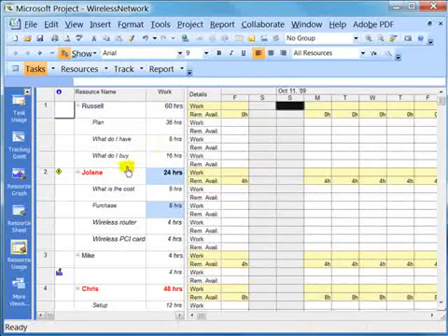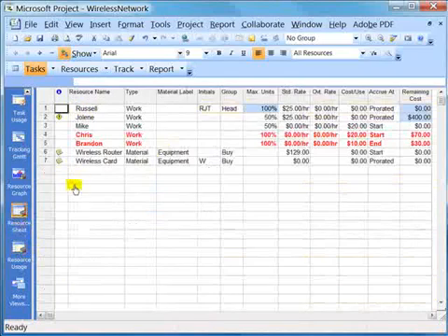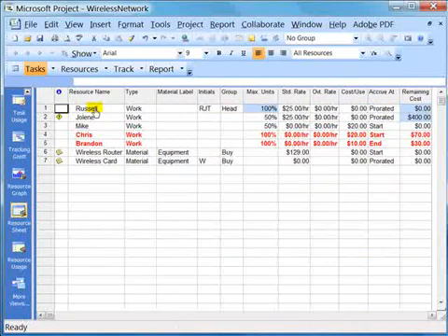And of course, that would go ahead and resource. As you can see, I'm no longer over-allocated. So looking at my resource sheet, I fixed my problem. However, I probably caused more problems. So just be careful when you're resource leveling. You can have a tendency, when you do resource leveling, to actually under-allocate resources.